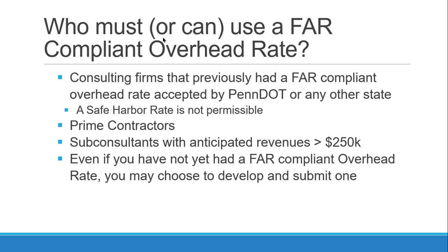Who must or can use a FAR-compliant overhead rate? Consulting firms that previously had a FAR-compliant overhead rate accepted by PennDOT or any other state agency must continue to use a FAR-compliant overhead rate. In this situation, a safe harbor overhead rate is not permissible.